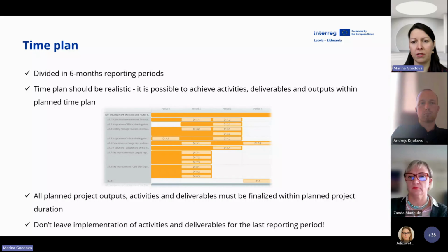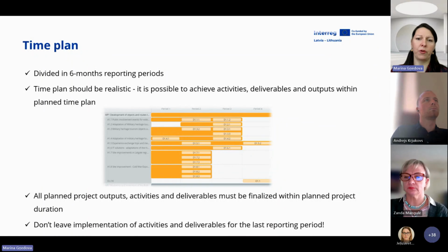Such planning puts at risk the achievement and successful finalizing of project objectives. And also for investments, try to plan the purchase of equipment and some major activities in the second or third period, in the middle of project implementation. Don't put them at the end.